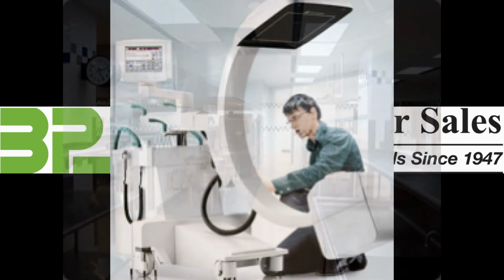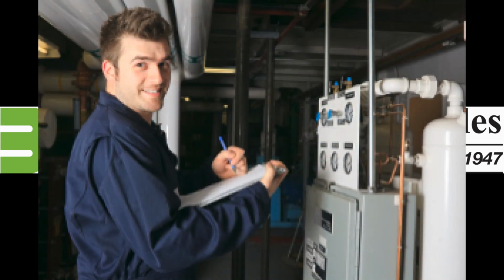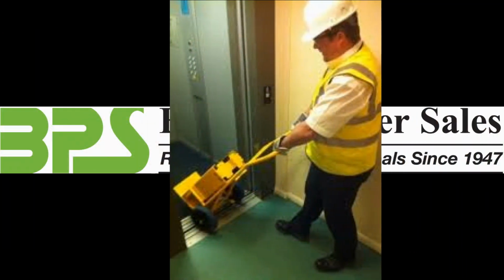To help simulate load, have the factory trained technicians there to simulate loads on the equipment and answer any questions during the testing period. Technicians can assist in the proper documentation during the testing period. And if necessary, do the immediate troubleshooting, maintenance, and repair so that the test can continue. Here we see weights being added to an elevator.